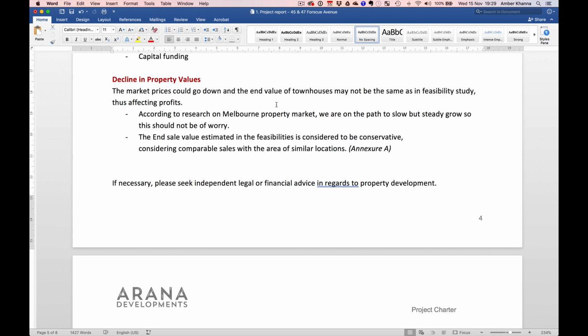That way they've seen, okay, he's showing me 2 feasibilities. One's the best scenario. This is what we plan on achieving. But if they are happy and comfortable with getting into the project where you showed them all the costs have gone up 5%, and all the sales have gone down by 4% or 5%, and there is still 10% or 11% development margin in it, and you are still coming over the top, people would be more willing to step forward in that scenario. Okay. I'll present different scenarios. So I guess you'll have to do a feasibility, then save it as normal, and then save the other one as fire sale or contingency scenario.